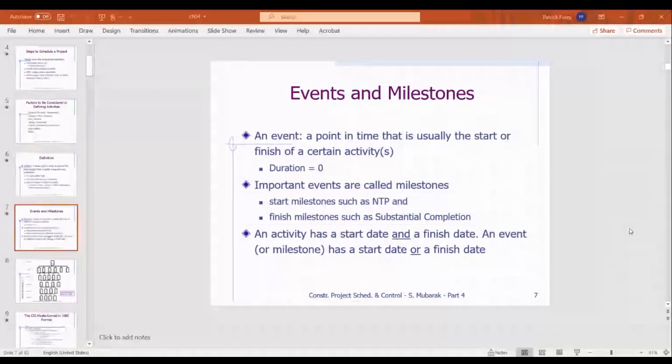occupancy, substantial completion, those are all kind of interim. There can be a temporary occupancy. Those are all just kind of iterations on a similar concept of, yeah, we're just about done, but we don't want to wait 3 months till we get the special fan that was ordered for the director's office or something like that. It's kind of bad form to hold out retainage or final payment to a contractor that's already put in all their money. They've paid all their labor, they've bought all the materials, and if you're holding back on some small insignificant scope, it's bad form, and it can lead to strained relationships between contractors and ownership or whoever's representing them.